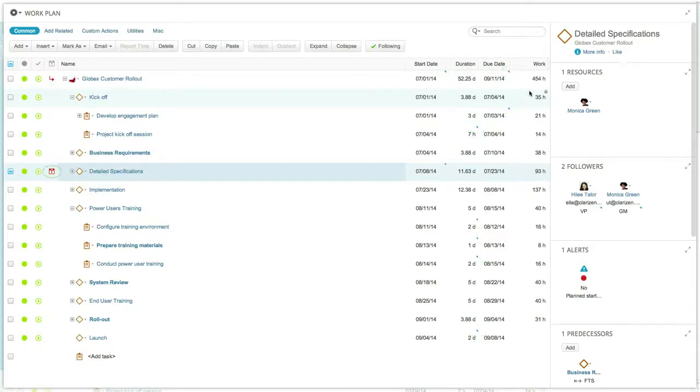The scheduling conflict indicator appears if there are collisions between scheduling rules. The likelihood of scheduling conflicts increases when dates are manually set by the user. When scheduling conflicts occur, the project manager needs to reschedule, crash some of the earlier tasks by adding more resources, or run some tasks in parallel.